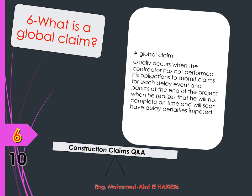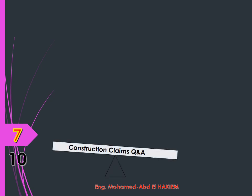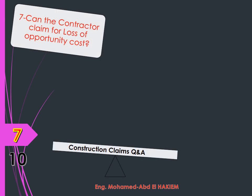In other words, the contractor is saying that all these delays occurred so they are entitled to an extension of time to when they finished the project. This is not a good strategy for several reasons. First, contracts usually require claims to be submitted within a strict timeframe. Second, in order to prove an extension of time is warranted, it is necessary to link the cause with the effect — each particular delay event must be demonstrated to have had a direct effect on the time for completion. This is the reason arbitrators and courts will seldom favour the contractor who submits a global claim.